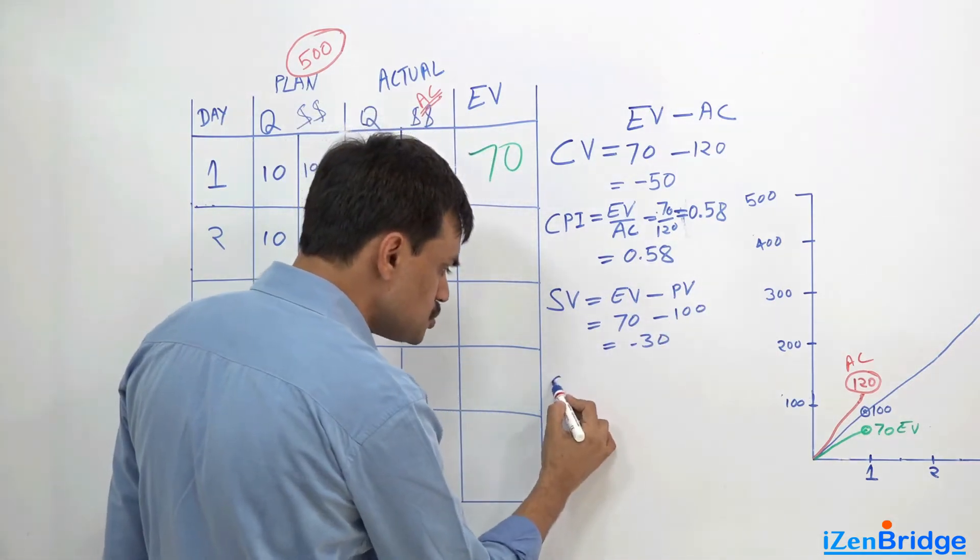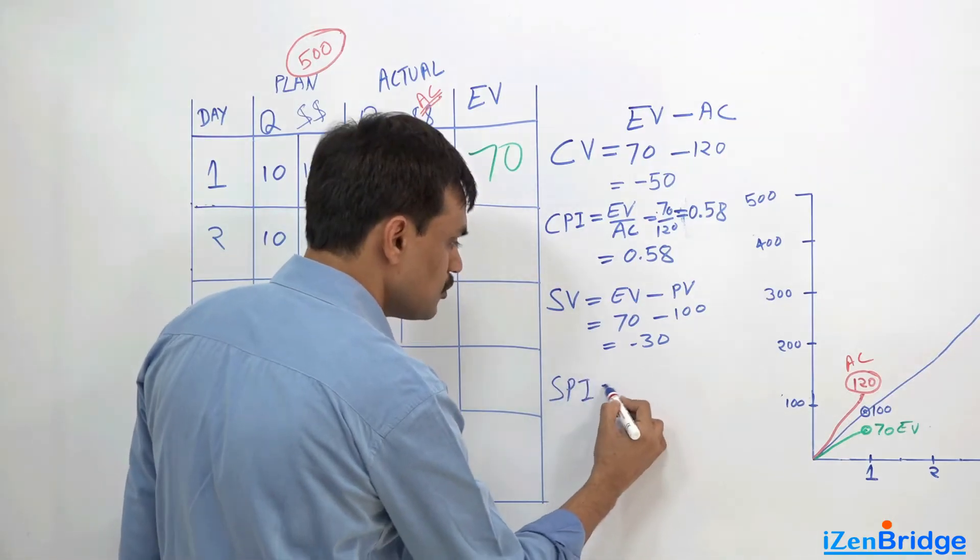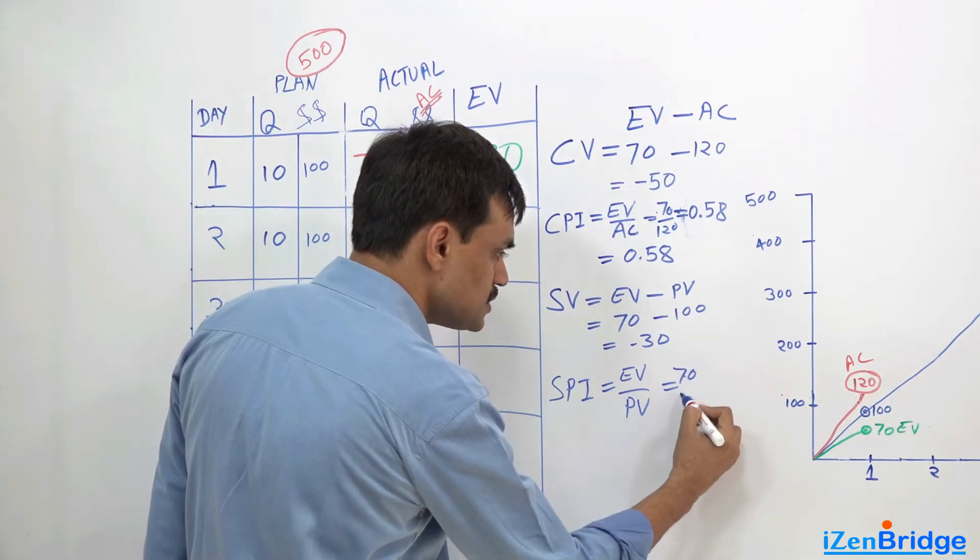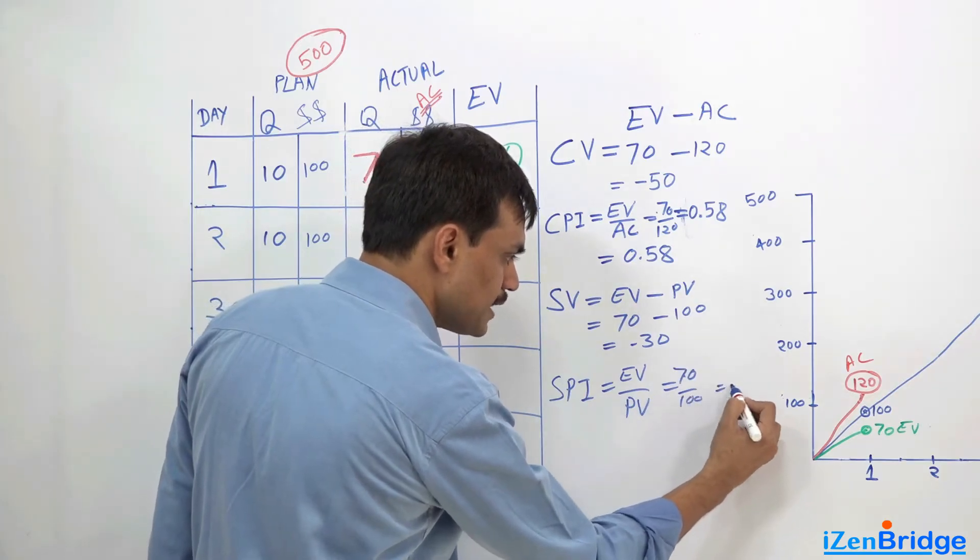Similarly, we have a schedule performance index, which is like earned value divided by planned value. In this case, 70 divided by 100, it is like 0.7.